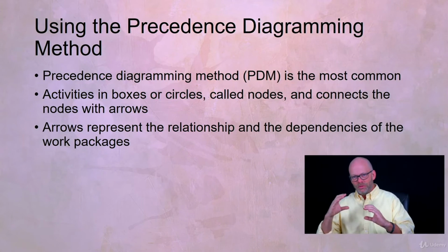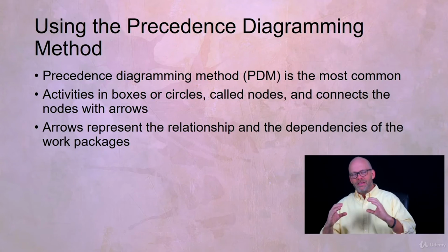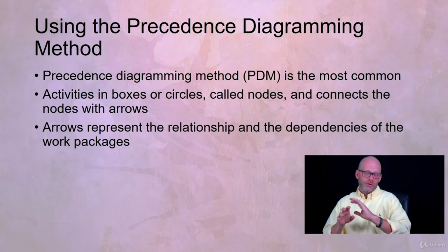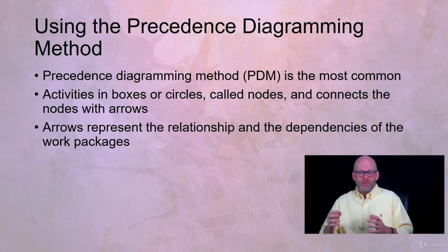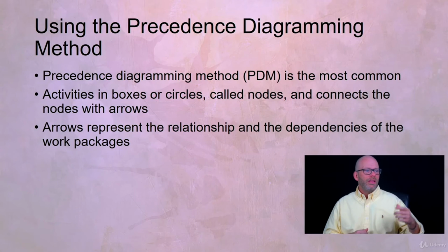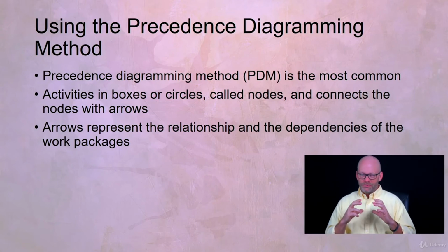Well, after this, any activity after this would succeed this guy. So this could be paint the wall. So paint the wall is now a successor. And this guy, in this instance, is a predecessor. So don't let that trick you that it could only be one or the other. So an activity could be both because you could have predecessors and successors.